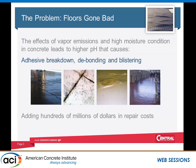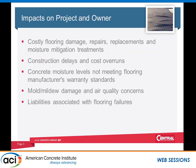This ends up having to be remediated — either the flooring is torn out and something put back in its place — and it costs millions of dollars each and every year. Before the floor is put down, there's an issue of getting the moisture in the concrete down to a level that will accept the flooring and maintain valid warranties from the flooring manufacturer, adhesive manufacturer, and flooring installer. This creates huge impacts to the owner, and on the construction side the big issue is construction delays requiring either waiting for the concrete to dry or putting down a moisture mitigation system.